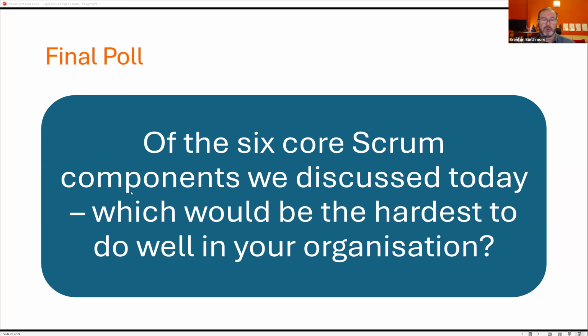That makes the product owner's job very difficult because the simplest equation is to say that a fixed price buys you a certain amount of user story points. It doesn't buy you features. It doesn't buy you user stories. It doesn't buy you capability. It buys you story points. That's the way Agile works.